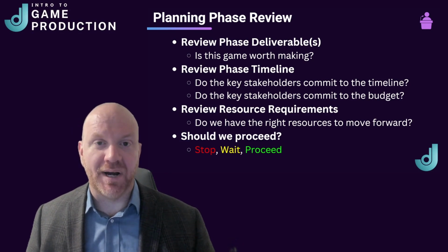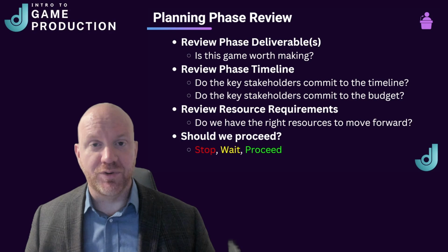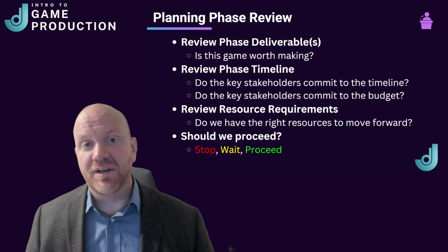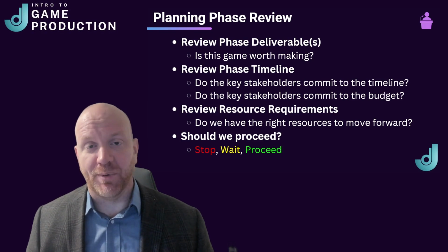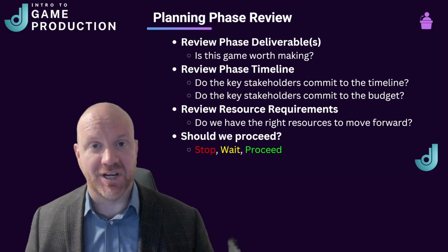And we want to get buy-in from the key stakeholders that they commit to the timeline and they commit to the budget. We also want to review the resource requirements and ensure that we have the right resources needed to proceed with the project. So in a lot of companies where there may be multiple projects going on at the same time, you may get the direction to wait until some of the resources become available.